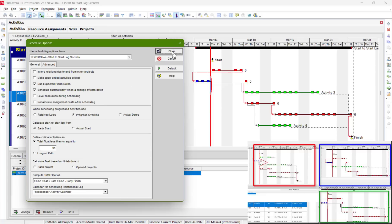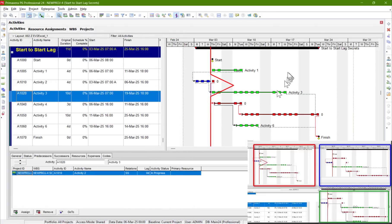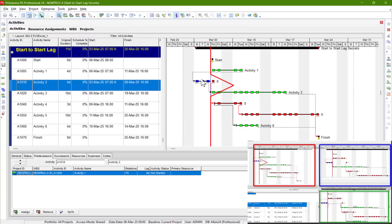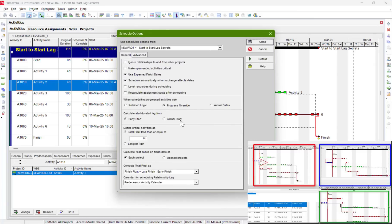With Progress Override everything gets overridden — we don't want that. We only need this for specific start-to-start relationships, not for everything. So here is the important part, and this is the secret: go back, keep Retain Logic, but choose Actual Start.